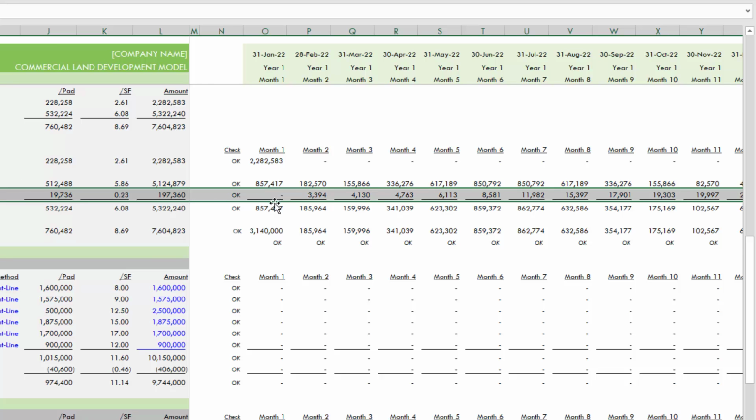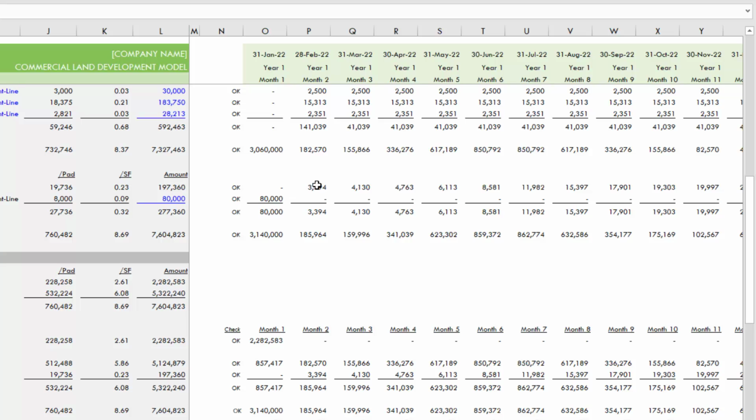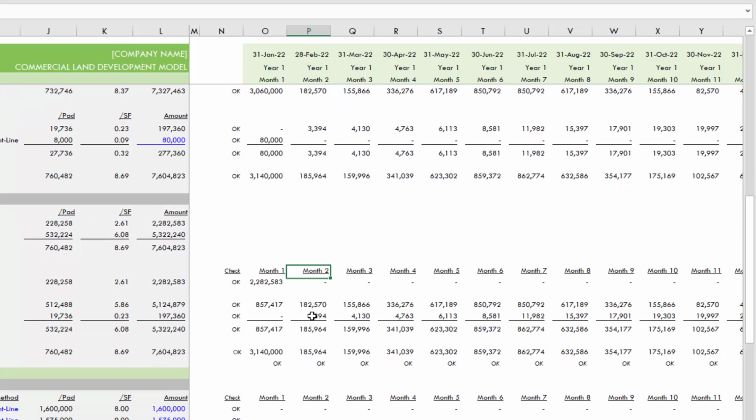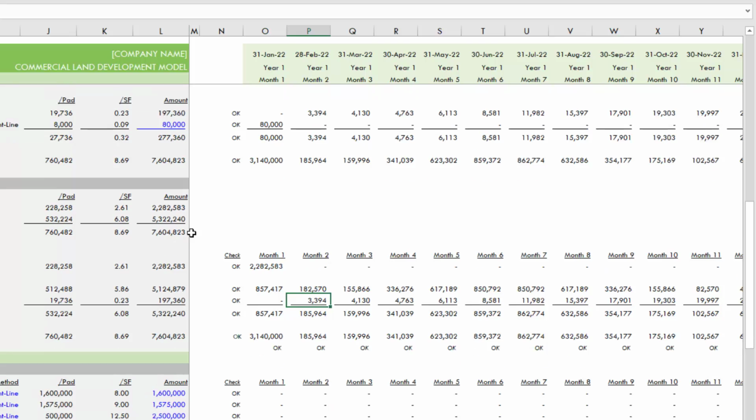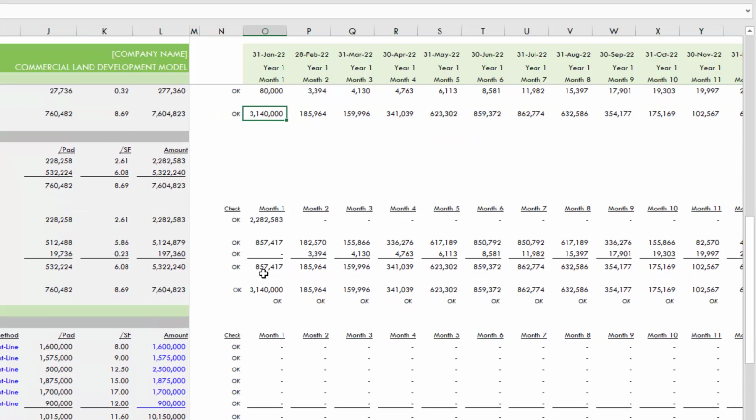And this is the interest reserve, right? Up here, you can also find the capitalized interest, 3,394, which mirrors the interest reserve. You'll also see that the total project cost after debt, or the total uses, equals total sources in each period. In other words, these are the sources that are covering these uses, and you can track that out all the way to the far right.